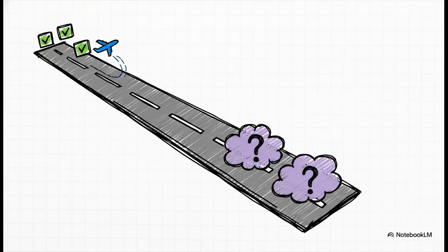Second, you need what's called a groomed runway. Think about it like an airplane runway. It needs to be clear for takeoff. This means the items at the top of the backlog are small, they're super well defined, and they are totally ready for the team to just grab and start working on. It creates a really smooth, continuous flow.